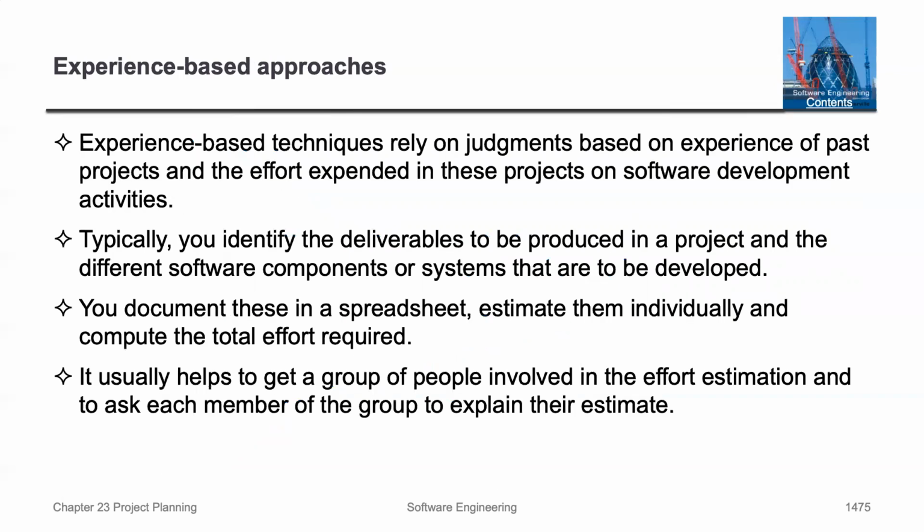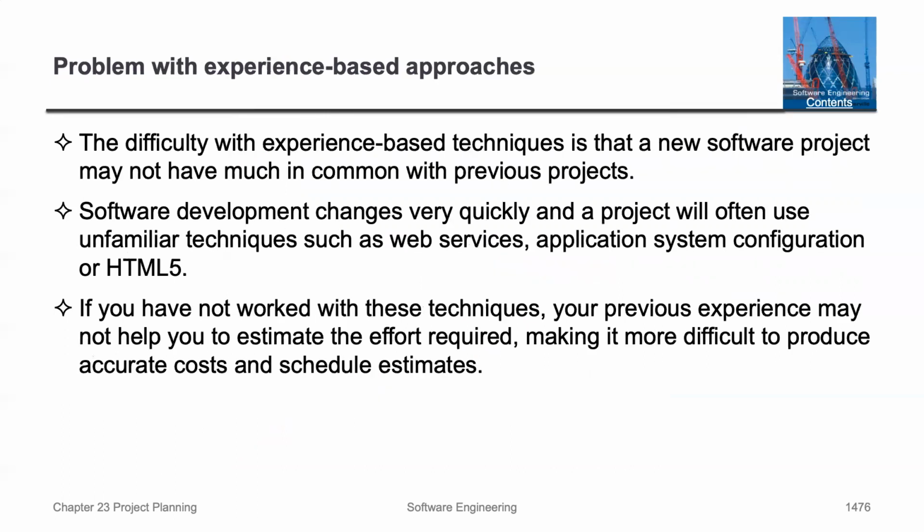For experience-based approaches, experience-based techniques rely on judgment based on experience of past projects. Typically, you identify the deliverables to be produced by a project and the different software components. You document these in a spreadsheet, and it usually helps to get a group of people involved in the effort estimation, to ask each team member of the group to explain their estimate. So what are the problems with the experience-based approach?